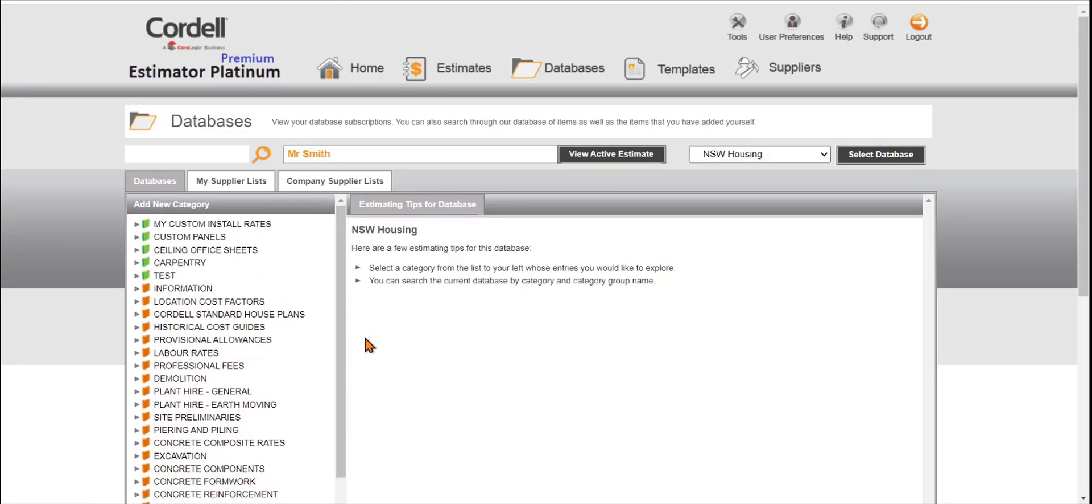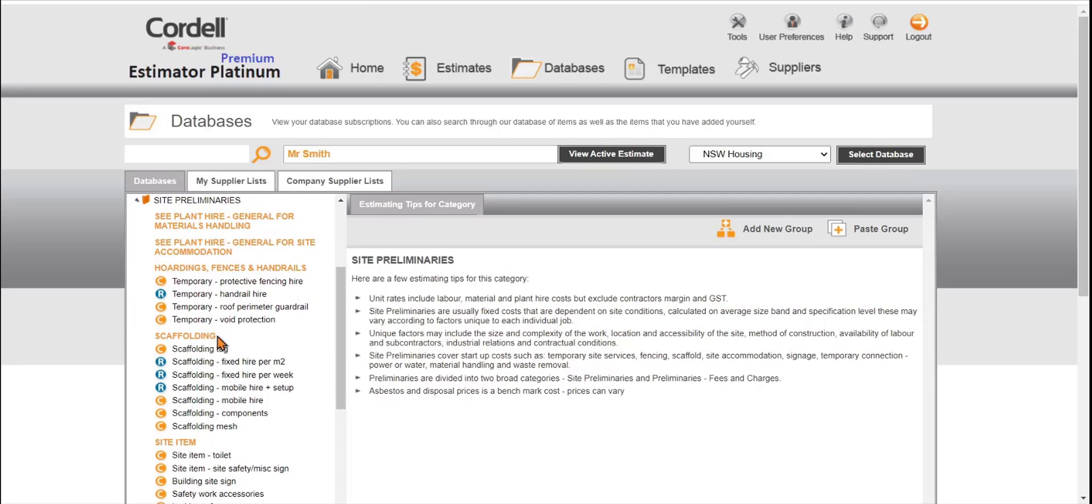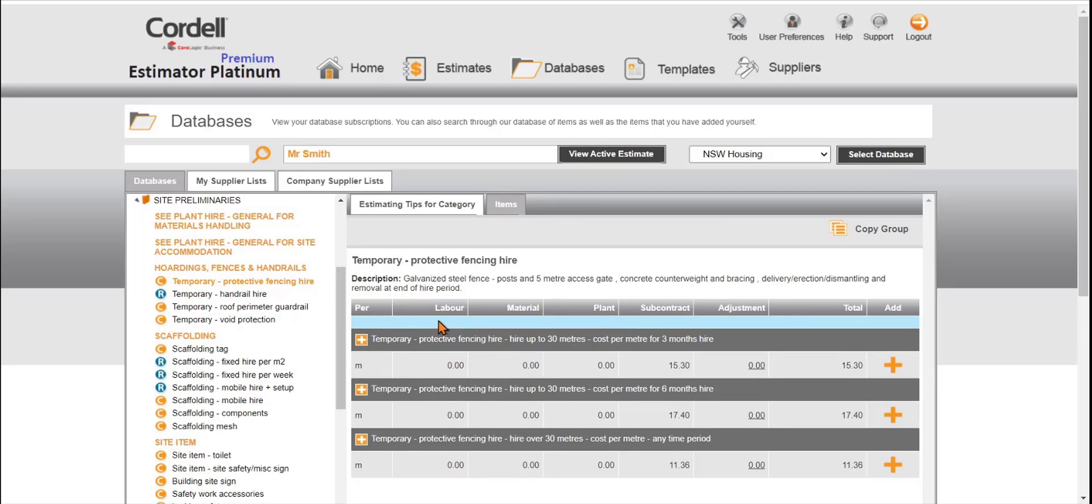In any database you can combine different price line items. For example, what we're looking for is site prelims. What we might even add first is temporary protective fencing hire. What we need to check is what the description is and also what the item is. Also remember our pricing for our recipes are broken into labour, material, plant and subcontract in the first principles method.